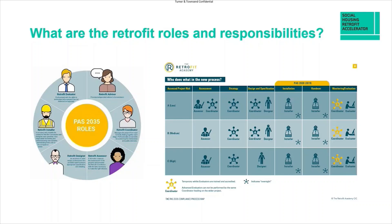The retrofit evaluator is responsible for ensuring an assessment is undertaken during the post-installation stage of the project, to evidence whether intended outcomes have been achieved. This includes a post-occupancy questionnaire with the resident, and can also include other activities depending on the risk rating or if issues have been identified, such as air tightness testing or thermal imaging.